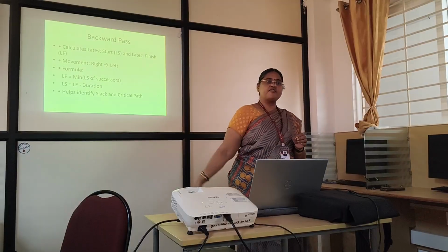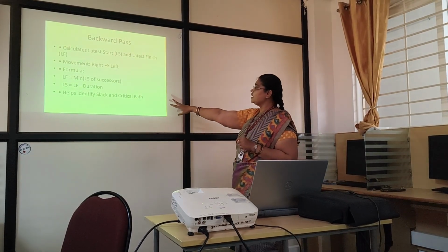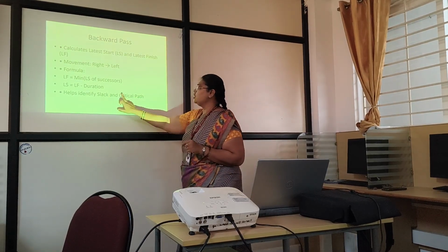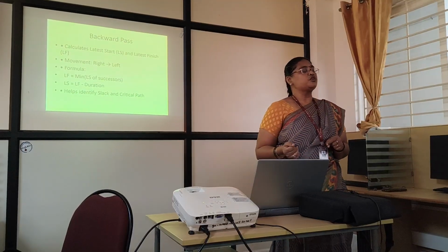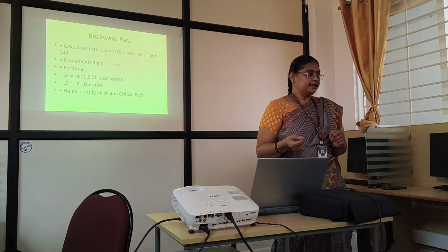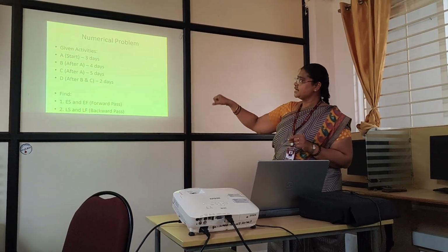That is the formula for LS actually. LF minus duration. So it is going to help in the case of what is the slack value and what is the critical path. We will see in the next slide what is slack and how the calculation of the critical path method will be carried over. So this is one example of the problem stated.